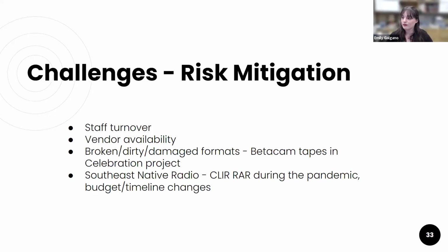You also want to think about broken, dirty, or damaged formats. We have a project for a celebration, which is a biennial event that happens every other year here at SHI, started in 1982. That's where all those Betacam and Betamax tapes come from. When the first ones from the 80s were digitized, our vendor found that they were absolutely filthy, and they couldn't get any content from them until they manually cleaned the tapes. That ended up taking a lot longer than we thought it would, because no one was expecting that issue.